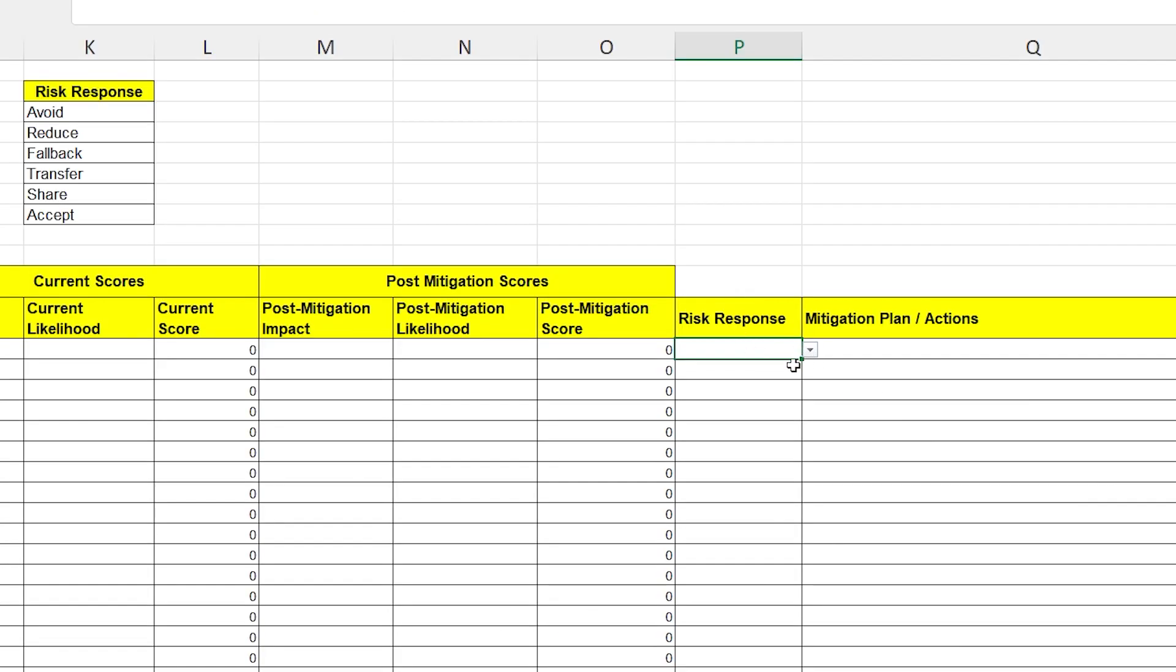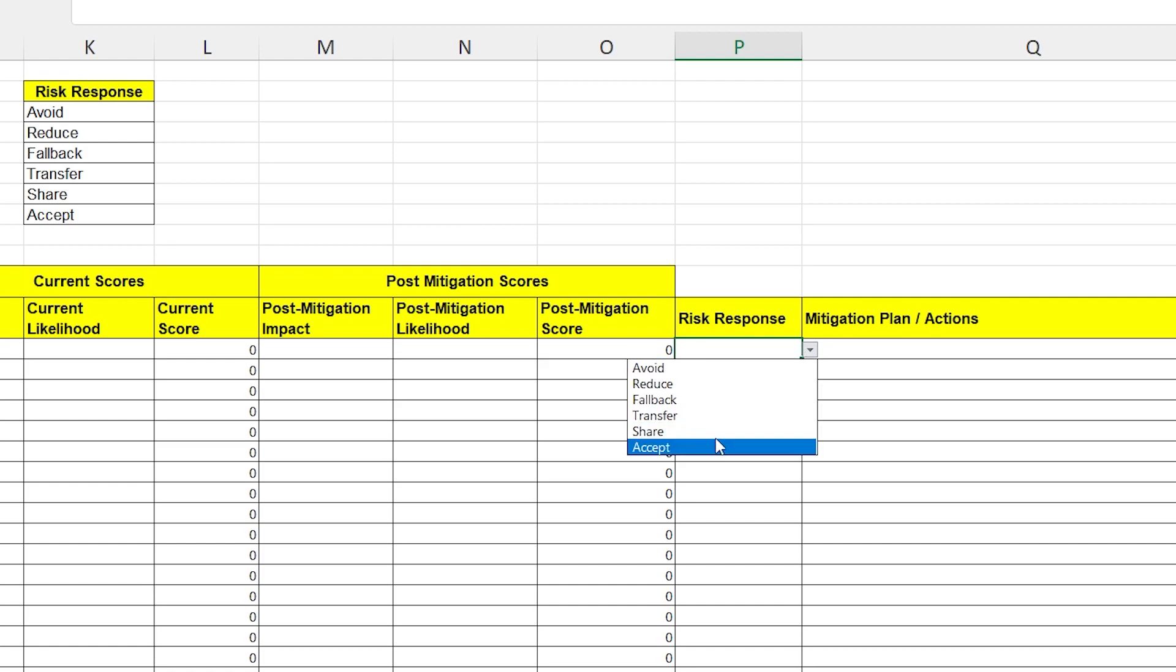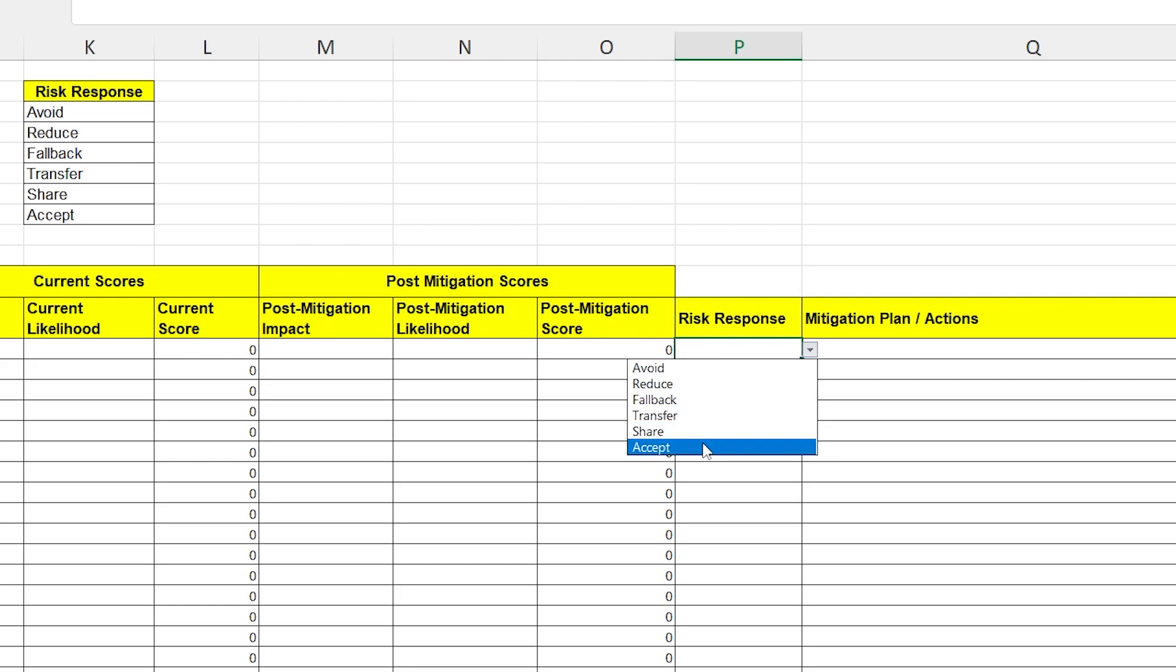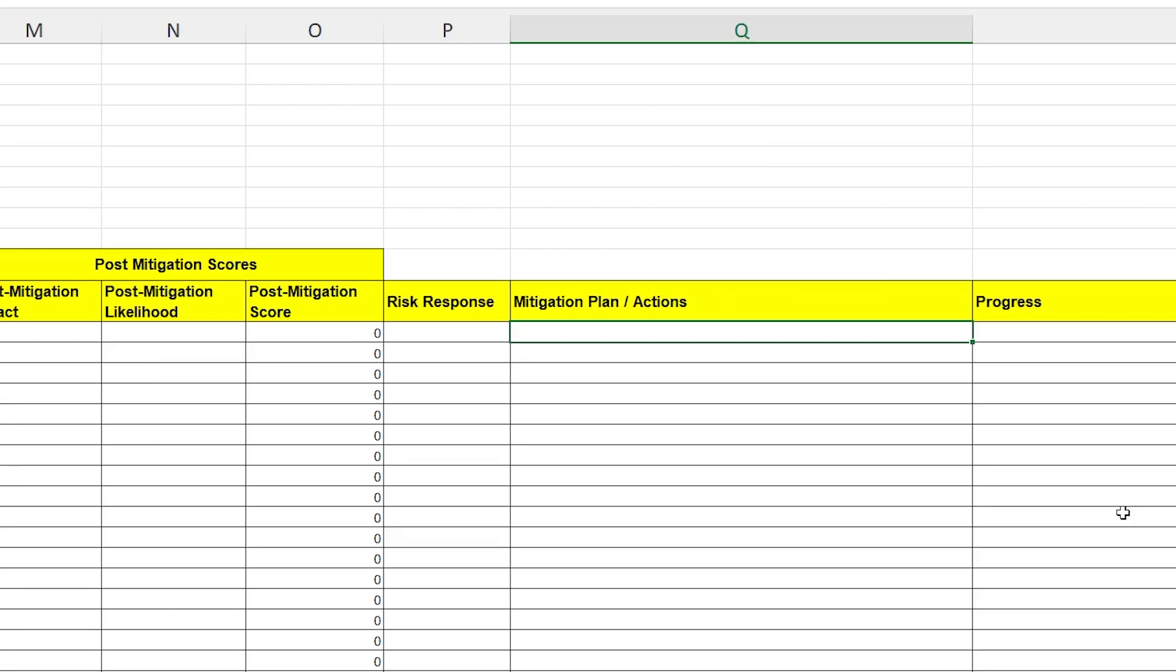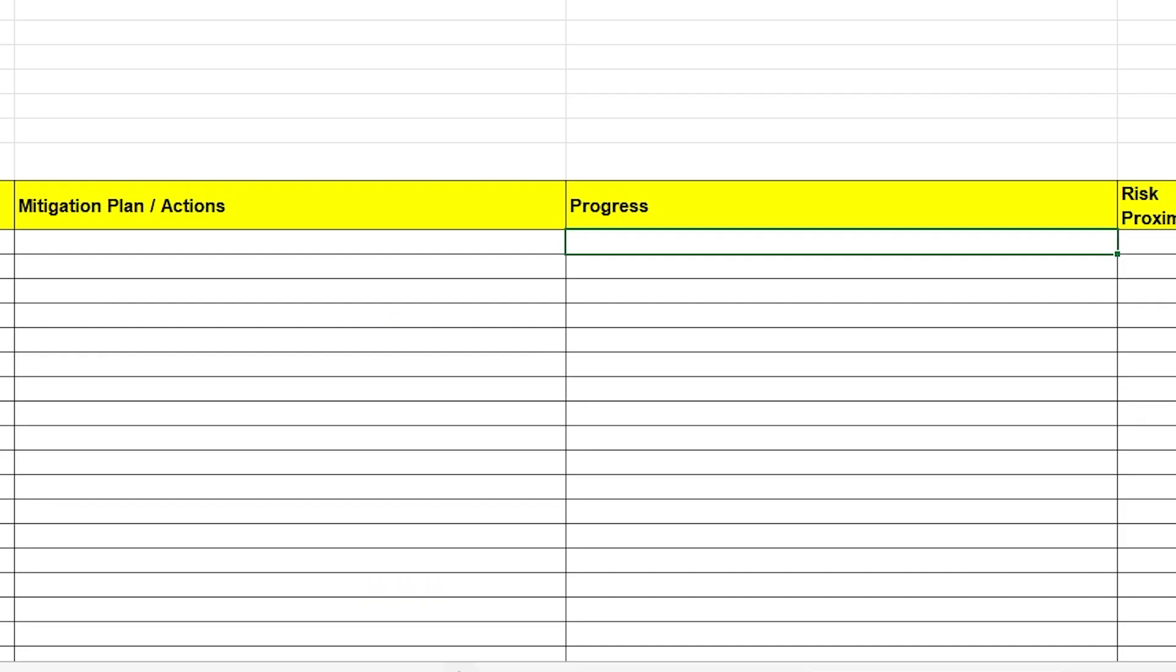Next, we're interested in the risk response. How are you going to deal with this risk? This is a drop-down, again, looking at this table here with various strategies on how to manage risks. Next, we have a section to include your mitigation plan and actions. Like any good plan, this should be a list of actions, tasks, deliverables, each with an owner, each with a target date. In the progress column, you can include an update on how each of the mitigating actions are progressing. One thing that I found to be really helpful for tracking the progress on here is to make sure that your mitigation plan has numbered actions and your progress is also numbered to correspond to the numbers of the actions.